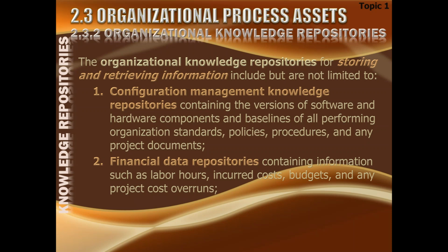But there is a bigger plan than change management plan, that is the configuration management plan. And configuration management plan is keeping track of all the versions of documents, of deliverables, everything which I am doing. I am keeping all the previous versions together into a cabinet or a computer archive. Maybe if your system is totally archived, totally digitized, then probably the configuration management of project is also being done on computer, as in the case of network.